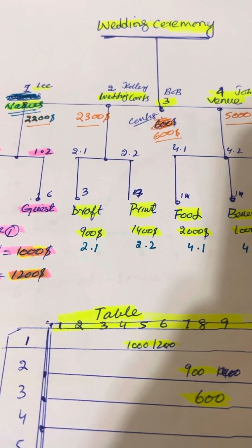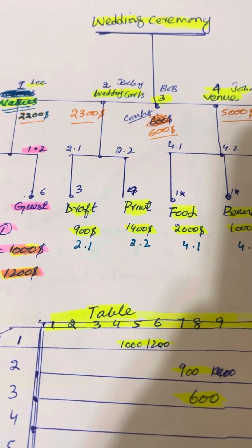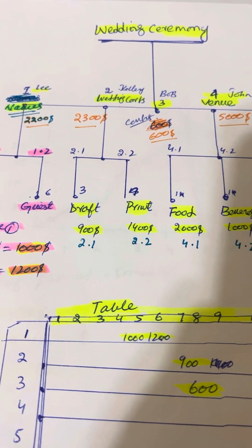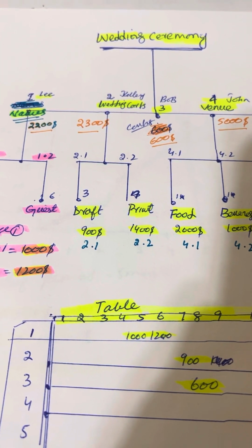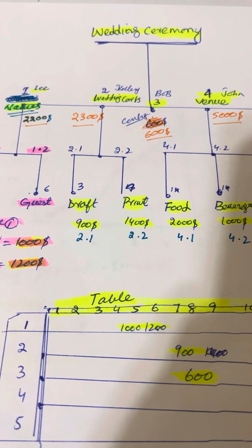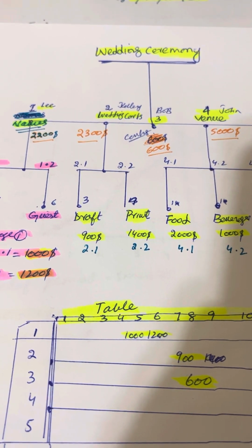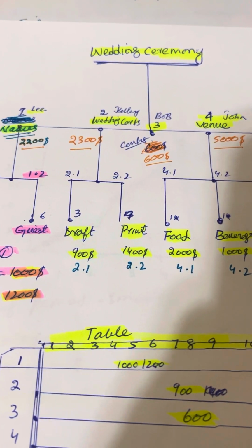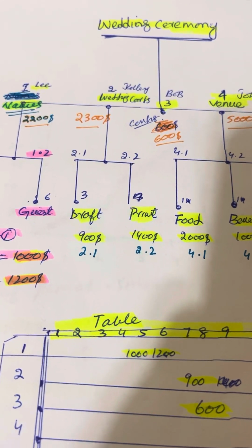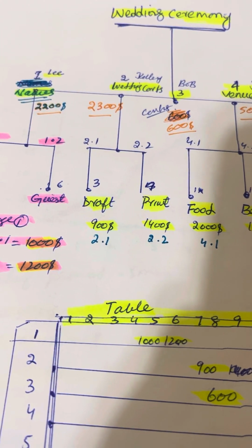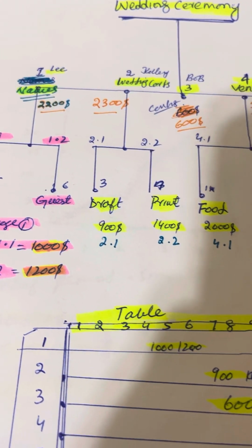The budget calculation actually starts from the work breakdown structure of the project, in which we divide the scope into deliverables and deliverables into activities, and when you combine those activities for the same deliverable, it's a work package.